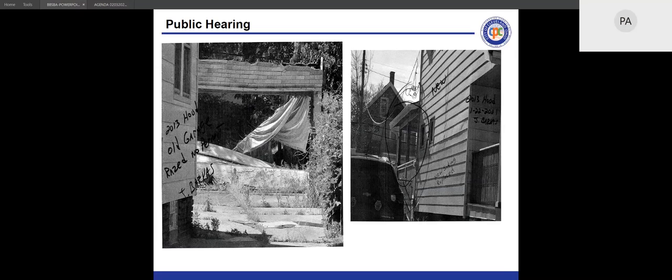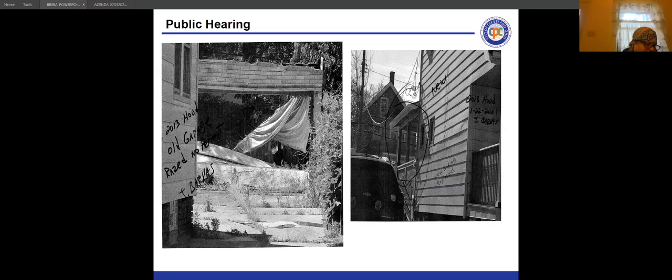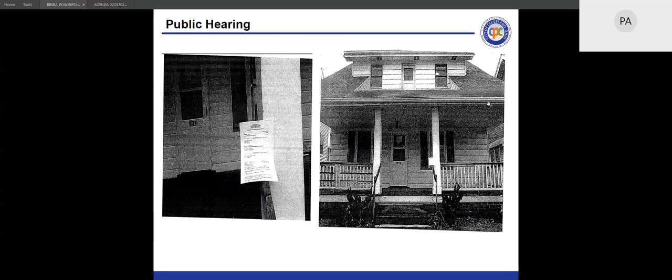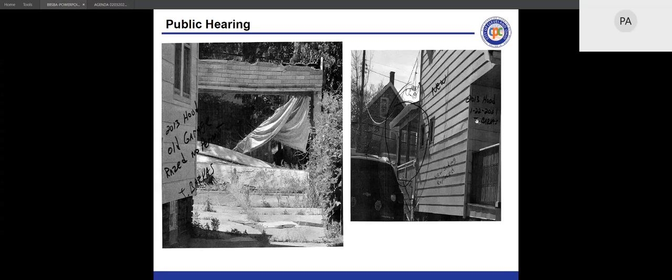The appellant argued the garage photograph shows nothing that could be called a garage structure. Mr. Vanover countered that under the Ohio Administrative Code, even a partial structure is covered by the Residential Code and requires a permit to remove. He stated the remaining pieces were a hazard requiring removal under the building code, and both the removal and any associated trash cleanup required permits. The city asked again whether the appellant obtained the necessary permits; the appellant said they hired out the work and assumed the contractor obtained all necessary permits.